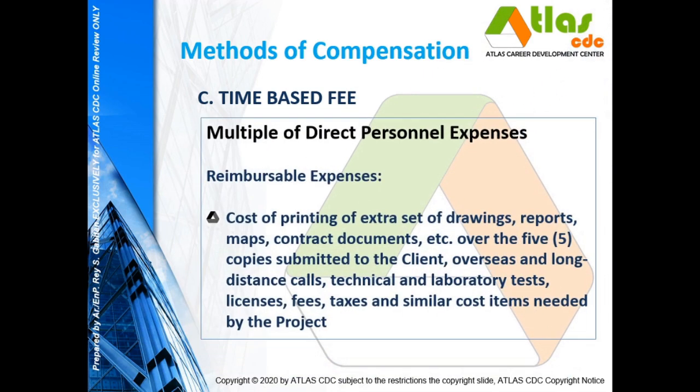If there will be extra sets of drawings, reports or maps, contract documents that is over the 5 copies submitted to the client, then that can be considered also as reimbursable expense. Others will be overseas and long distance calls, technical and laboratory tests. If there will be need for licenses, fees, taxes, and similar cost items needed for the project, then that is also reimbursable expenses.